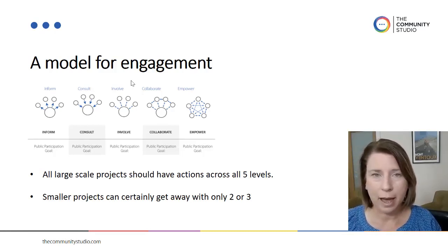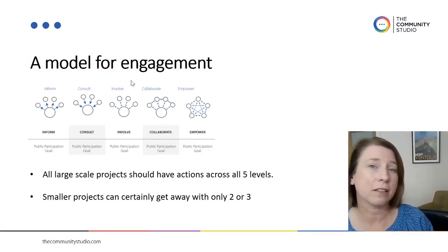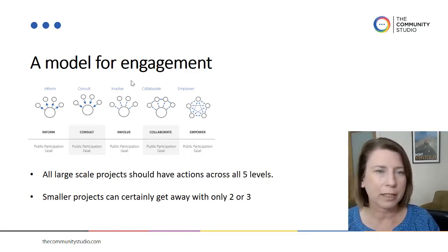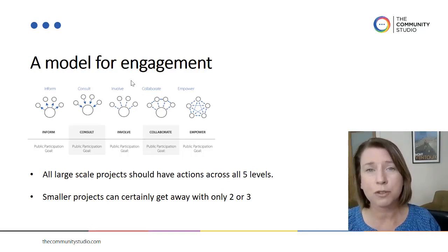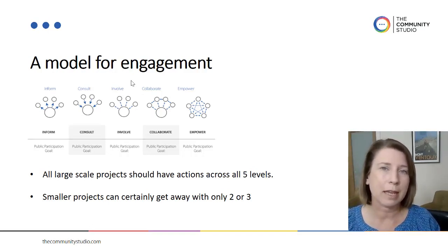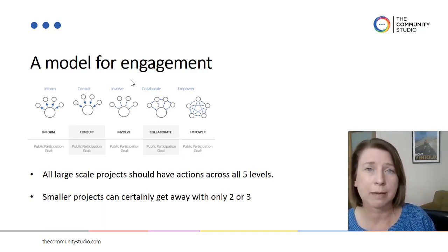Inform is perfectly okay. You often see when people are introduced to this model, they want to immediately head to the right of the spectrum, but inform is perfectly okay. And in fact, most of your stakeholders, the bulk of your stakeholders, will probably be in that inform category, because they just want the information, they just want to know what's going on, and they want that in a timely manner.